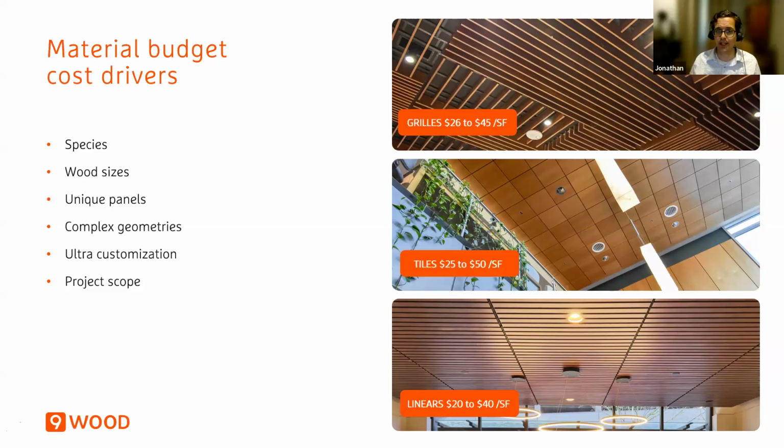And so if you're looking at larger profiles and sizes, make sure you get the budget information, impacts on the cost differences early on. So you know what you're getting into, because that can impact budget. And then of course, unique sizes, if you have like dozens of sizes that require factory cutting or field cutting coordination, that's going to drive up time and cost.